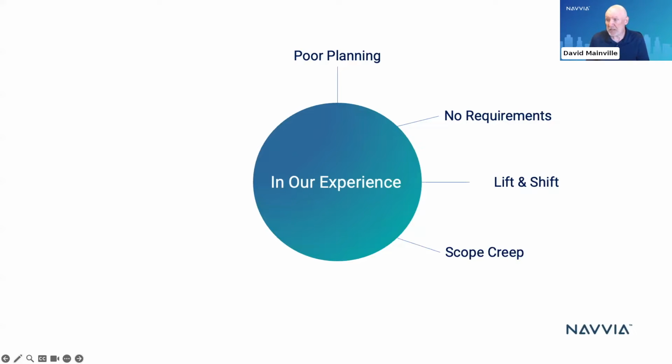Someone else mentioned scope creep, biting off more than you can chew. I think it was Pierre that said that. So if you don't have a plan, then scope creep will just take over. But if you have a good plan, you can help minimize the scope creep. If you want to keep adding features, functionality, and workflows, you need to be able to control that and contain it. So maybe not in phase one, but in phase two, or else your implementation date is going to keep shifting.